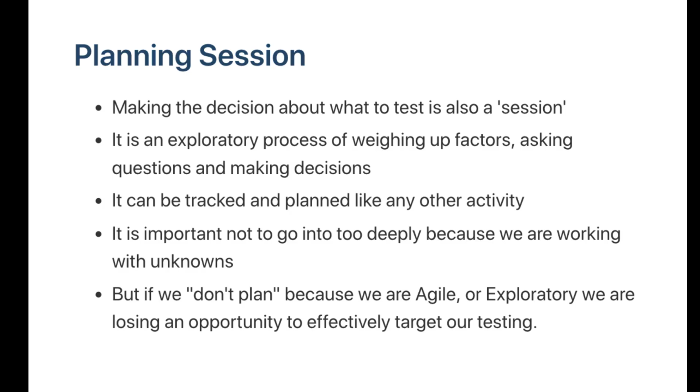But if we don't plan, then we may not have the resources that we need to hand. We may not realize that we need access to the database before we do the testing. So we may start, hit a blocker, and stop, because we didn't think it through effectively, which is really what planning is. But sometimes people don't plan because they're agile, or because they're exploratory, or because of whatever their misunderstanding of a particular word is. But if we don't plan, then we're losing the opportunity to effectively target our testing, to think about it, to identify our aims and objectives, to really keep on point and test as effectively as humanly possible.